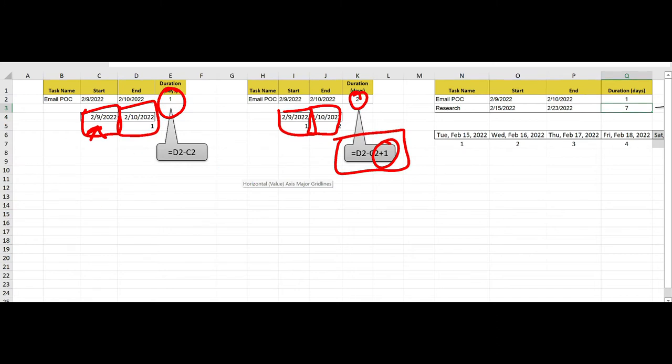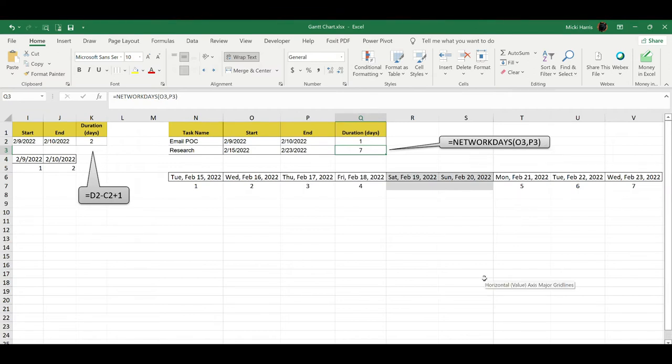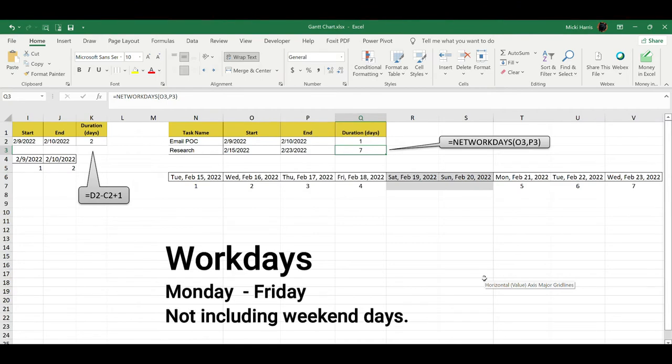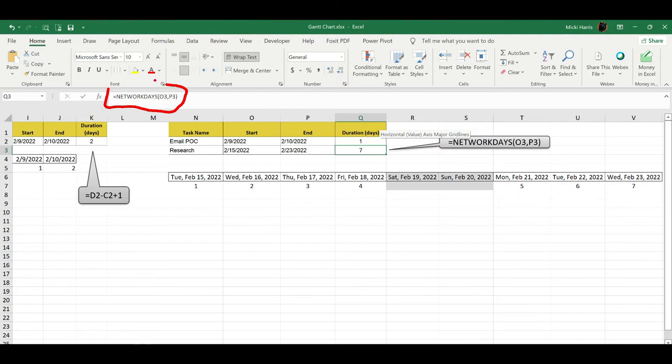But let's look at one more formula, and that is going to be the network days formula. So what's kind of nice about this is it calculates work days. If this is actually for a work project and you're not going to be working on Saturday and Sunday and you just want to calculate Monday through Friday, then network days might be the way to go. If I look up here at my formula bar, I'm using network days. And let's go ahead and open that up so we can see that.